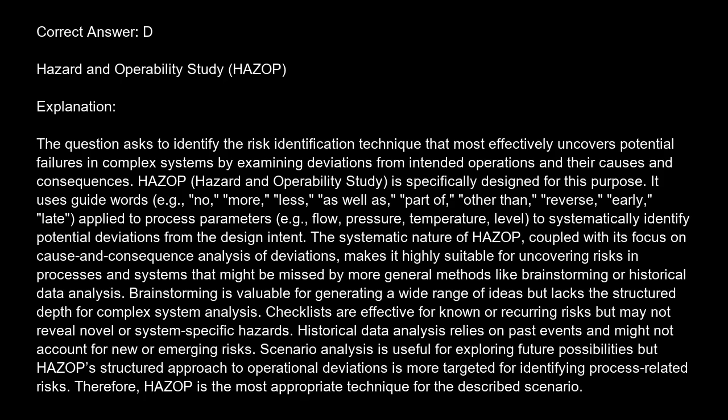analysis. Brainstorming is valuable for generating a wide range of ideas, but lacks the structured depth for complex system analysis. Checklists are effective for known or recurring risks, but may not reveal novel or system-specific hazards. Historical data analysis relies on past events and might not account for new or emerging risks. Scenario analysis is useful for exploring future possibilities, but HAZOP's structured approach to operational deviations is more targeted for identifying process-related risks. Therefore, HAZOP is the most appropriate technique for the described scenario.